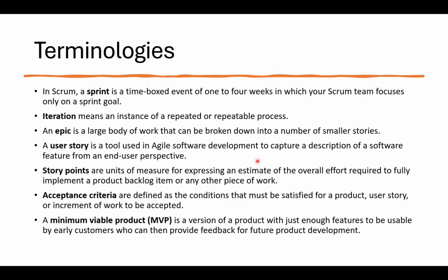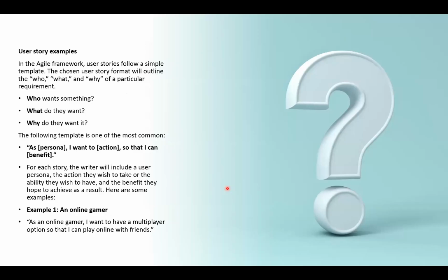So you can see the idea about waterfall and Agile. Waterfall is usually good where the process and the features are not likely going to change. Like you are almost sure, almost definite of the different stuff that needs to be done. In that case, we can go the waterfall approach. Just go and sleep and in 6 months I deliver. But because things are evolving very, very quickly, Agile is a more welcomed approach. And then we always give out things as minimum viable products.